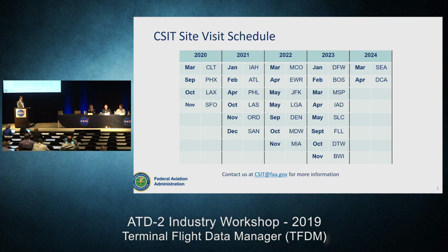If I move a site on the waterfall, there's a financial impact to the program. Not only with our contract with Leidos, because we're buying equipment for each individual site, there's site prep activities that have to occur to be able to modify the site and install the system. All these plans have been laid out through 2029, which is the full deployment time frame.